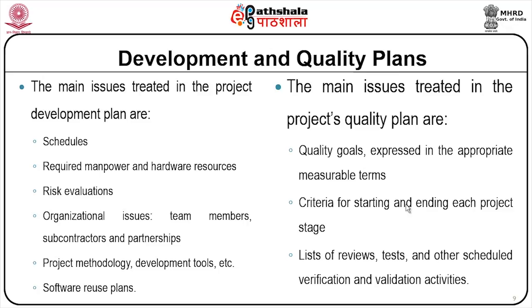schedules, required manpower and hardware resources, risk evaluations, organizational issues, team members, subcontractors and partnerships, project methodology, development tools, software reuse plans.